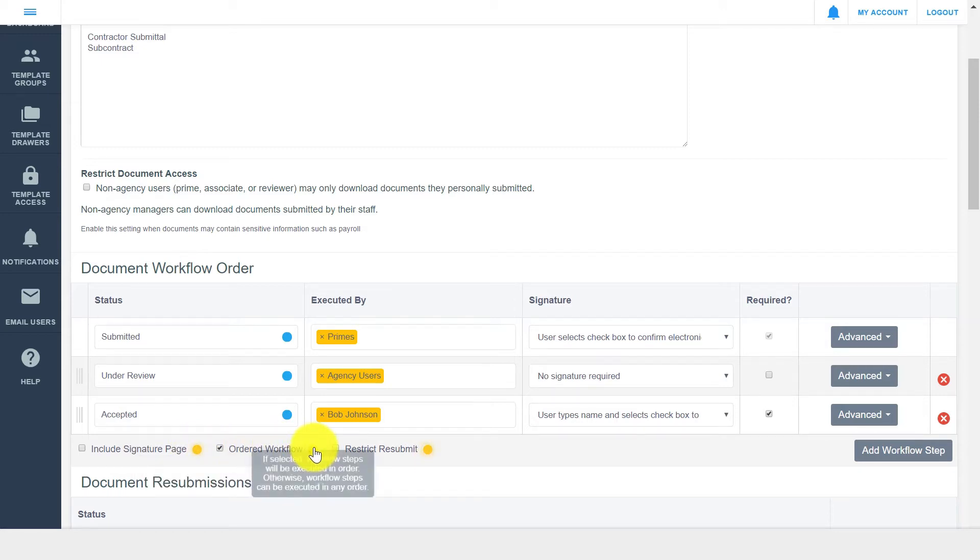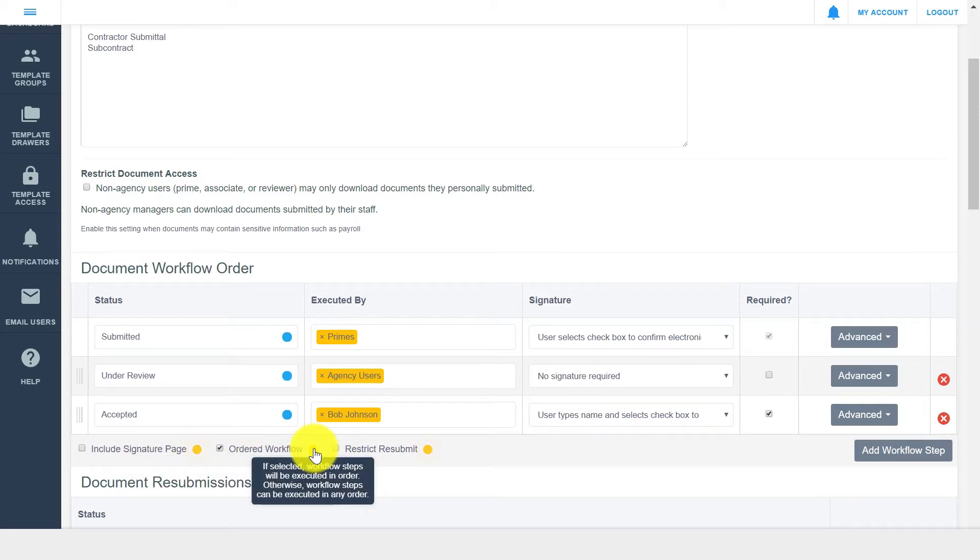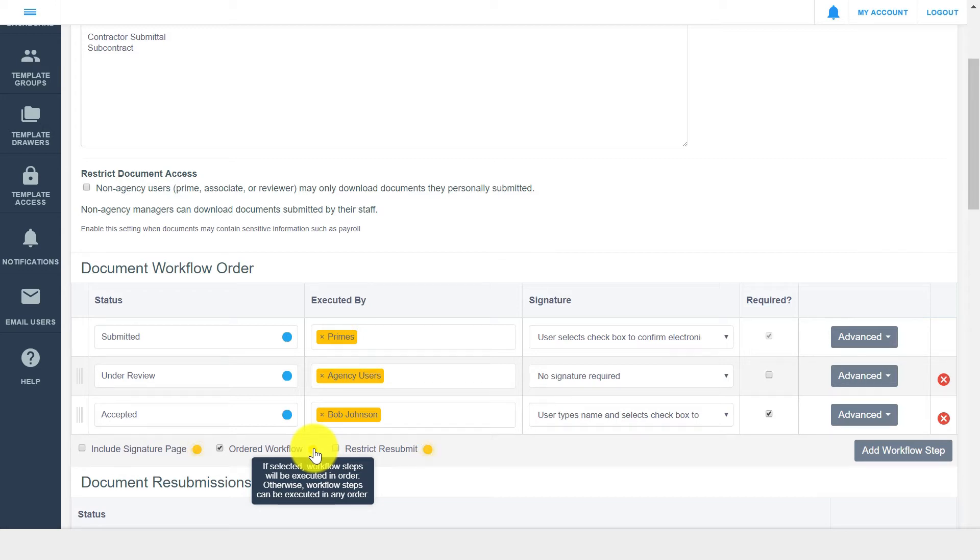The ordered workflow checkbox sets whether or not your workflow steps happen in the order in which they are listed. If it does not matter when a signer transitions the document, and only matters that all the steps are eventually executed, then clear the ordered workflow checkbox.